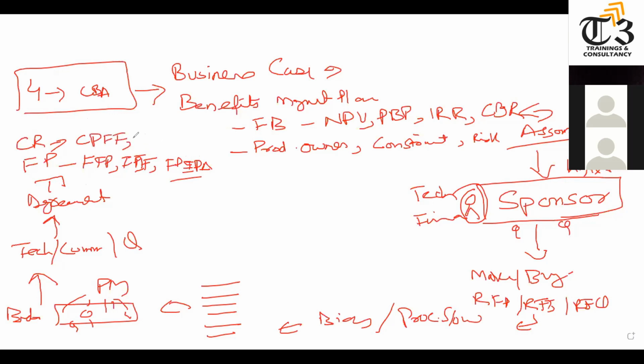It's kind of a lump sum that you will get: whatever you pay, we will give you, plus your execution fees. Or cost plus incentive fees, like if we have done the high-level estimates and if you can achieve it better than this, we can share the benefits. Or cost plus award fees, which means you will get all your legitimate costs, but if your performance is not up to the mark, then your fees will be reduced. Or we can do the time and material contract, mostly for consultations or staff augmentation training purposes.